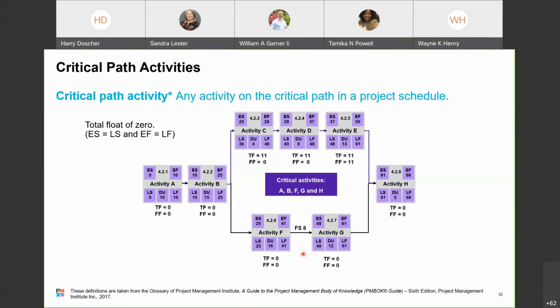So the difference between when this one starts, when this one starts, and the duration of this one and this one, and all down the line, okay, is why you have float. If these are different, you have float. If these happen to add up to the same, you may not have any float at all. The critical path would be the two right there. You'd have to keep an eye on both.